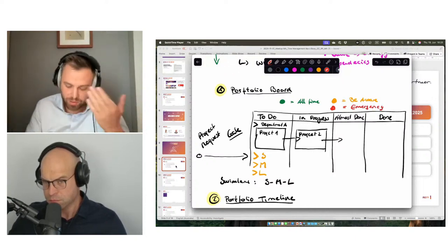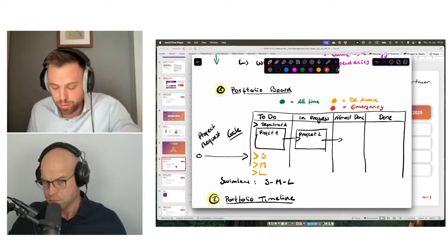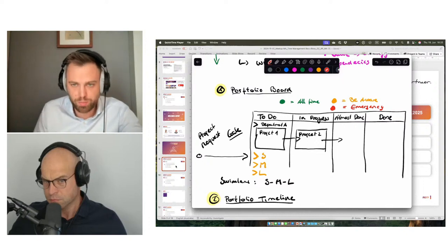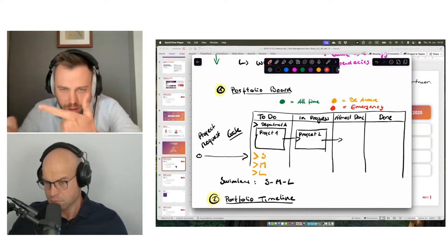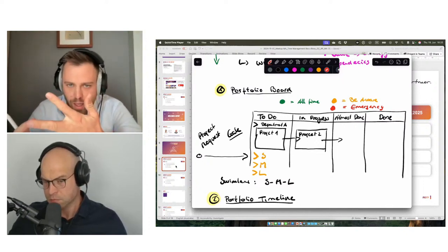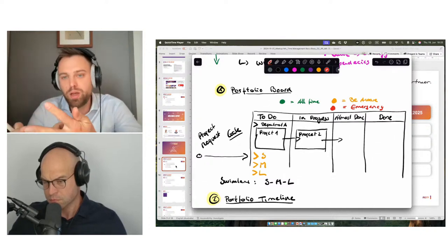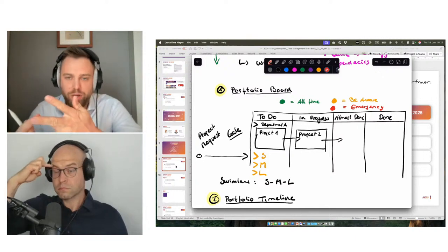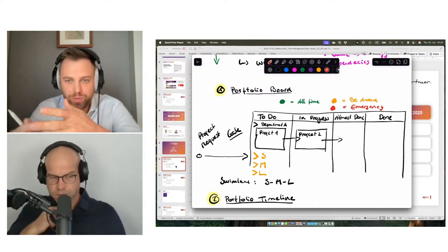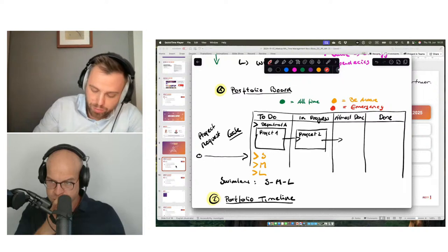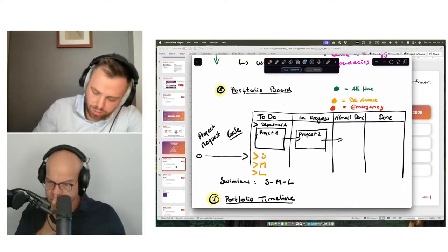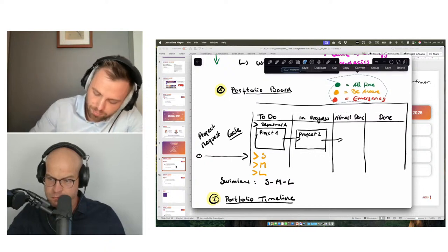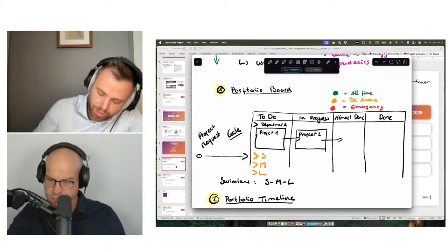How does that work? The project managers are responsible for filling out, every 4 weeks in a project, the status update based on: are we in budget? Are we in time? Are we delivering the scope? And if we're not, we must be aware. So if in the last 4 weeks we were not in the budget, put it on orange, and then things are on the radar. And for the management, it's pretty nice, because on the board in Jira, which is pretty simple for them, they have quick filters on top.